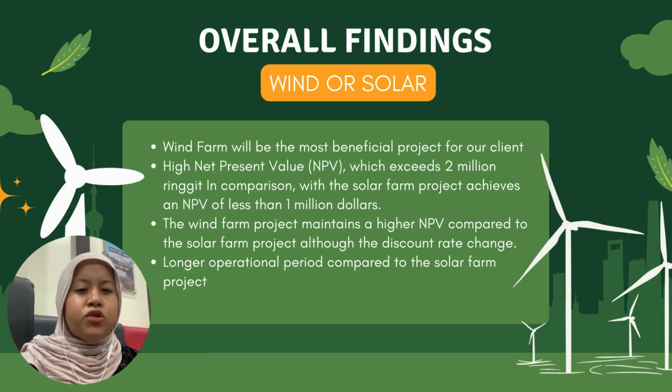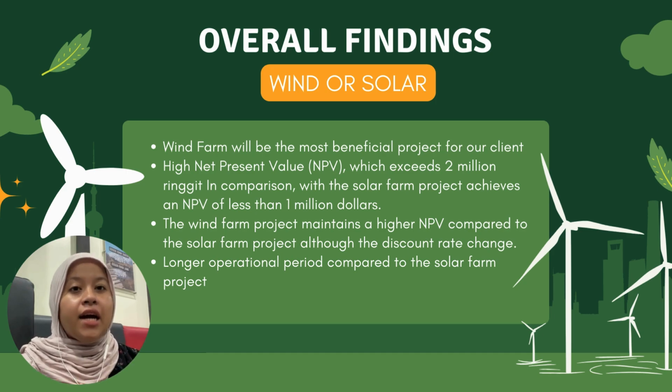Overall, the wind farm project emerged as the most beneficial investment for our client. This conclusion is primarily supported by its high net present value, which exceeds 2 million ringgit, in comparison with the solar farm project that achieved an NPV of less than 1 million. This shows that the superior NPV of the wind farm project indicates a more substantial return on investment, making it